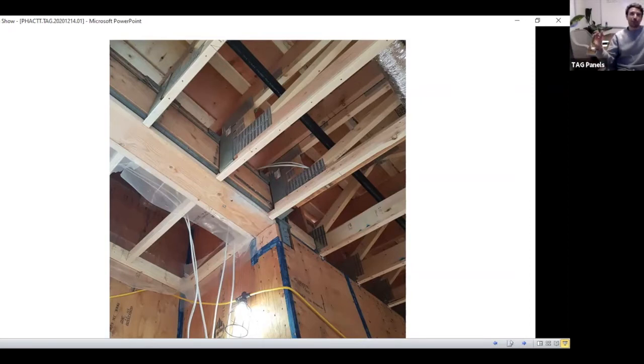And from a purely prefab ideal project, we would always want to prefab the roof because it removes one other layer of someone else coming in and either having a problem or there being differences. But this design just was required to have a truss roof. So the truss company landed their trusses the next day after the roof was finished. Fairly complex detail, not ideal from the complete world of prefab, but it's all manageable.